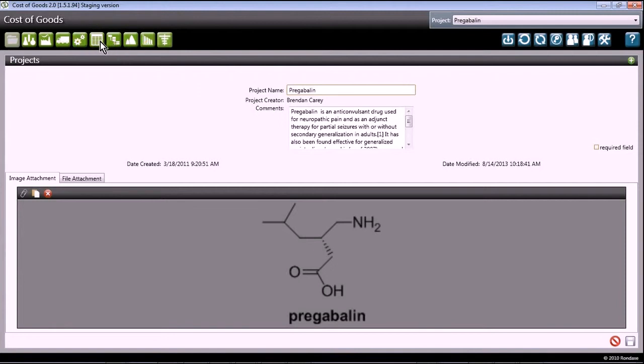The process information can be combined with information about the operations. For example, the scale of operations, the rate of the number of batches per week that are generated on that operation, and the number of men per shift that are needed to operate the facility, and the waste costs for that facility. All of this information goes together to make an estimate for what it costs to make the conversion of the materials into the desired output product.